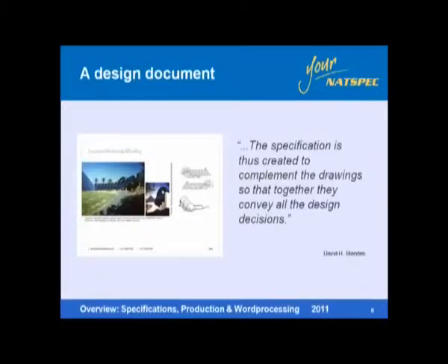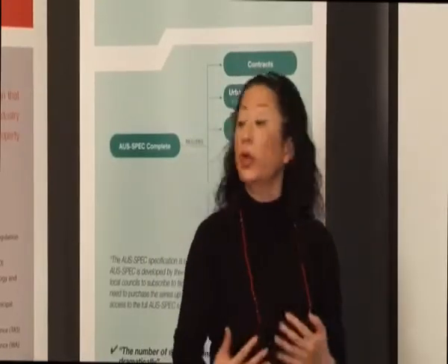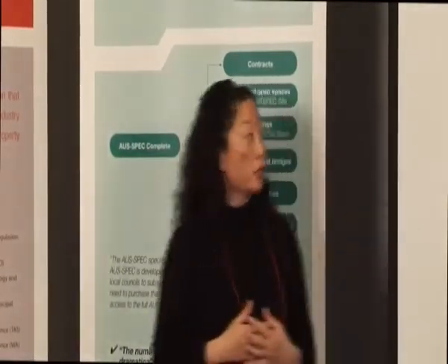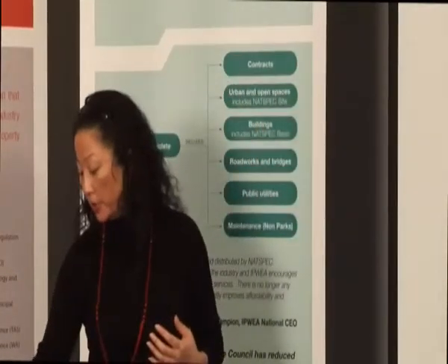The specification is also a design document. A lot of people don't think that because it's dry, it's words, it's boring, but it is a design document. The specification needs to complement your drawings. It's not there to duplicate what you've put into your drawings, because the more repetition you have amongst all your contract documents, the more you're leaving yourself open to conflict within those documents. You want the specification to complement the drawings and the other design documents.